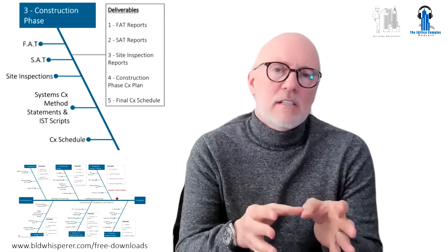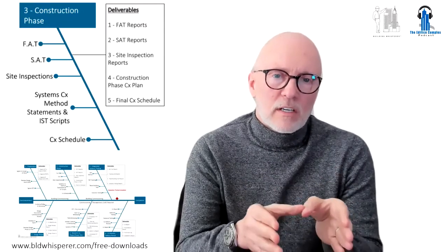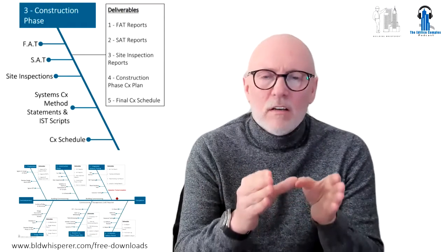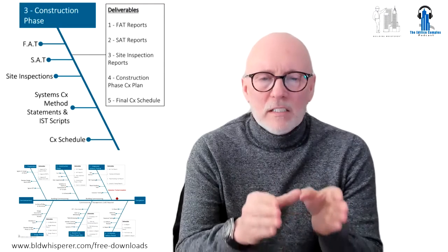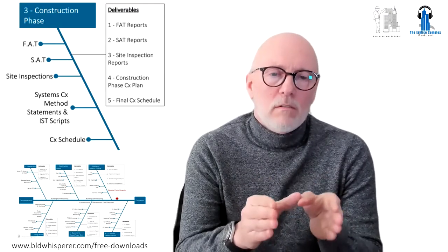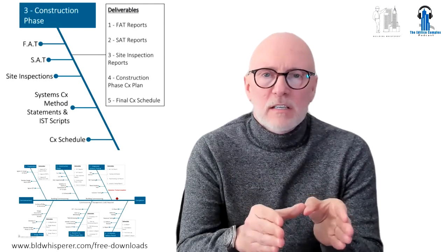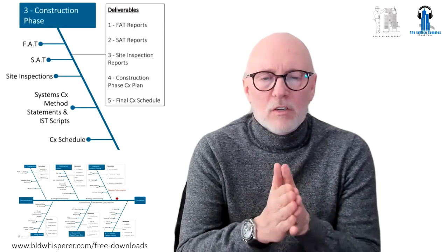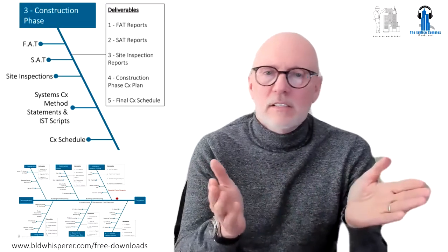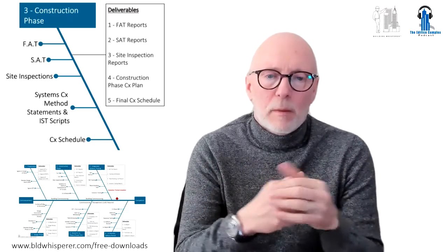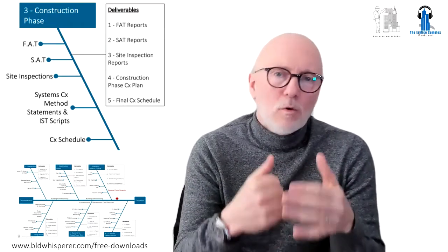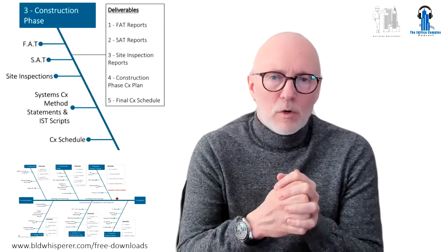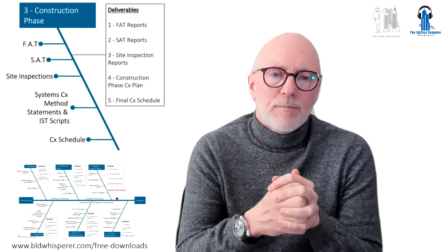Factory acceptance testing is a risk management strategy. It is never, not rarely, never specified properly. Please put in the spec what equipment needs to be factory tested and who should attend. That way it can be priced properly. Every job I've ever worked on, it's, oh, we've got to do that, this is an extra. It's always a big problem. Please specify it. If your building is not mission critical, maybe you don't need to do it. But certain buildings with mission critical equipment need it.